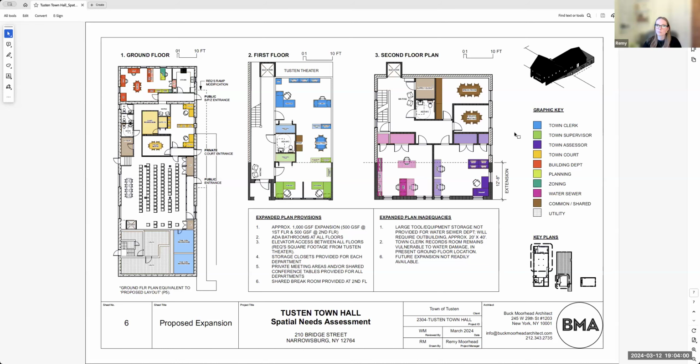So one would have to look at which parts of this would be in one of those categories from a pricing standpoint. And then you're an occupied building now, so people are moving, shifting, vacating. That's a cost someone would want to account for in thinking through this project as well.